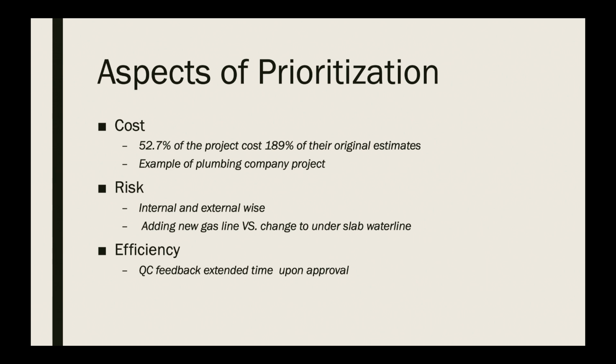So when setting requirements or adding new requirements to a project, some factors need to be taken into consideration, such as: will the new requirement require more labor and longer time to finish? Can the new requirement reuse the old code or does it require rewriting the old system? Does the new requirement require more equipment or documents that are going to cost extra money?